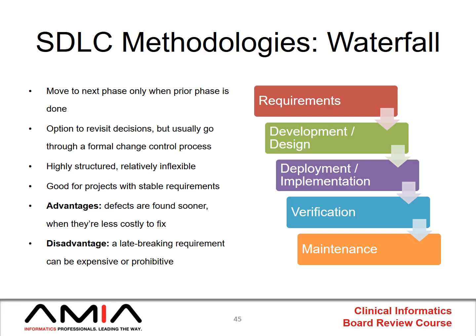So if you're in the implementation phase, you've got developers doing stuff, and then you find out that there's a giant gap in the requirements, it's often too late and costly to go back and fix that. So the vulnerability of this is that you might find some defect that's basically a deal breaker, and you might not know about it until the very end. And of course, that defect was something that should have been identified way early during the requirements phase.